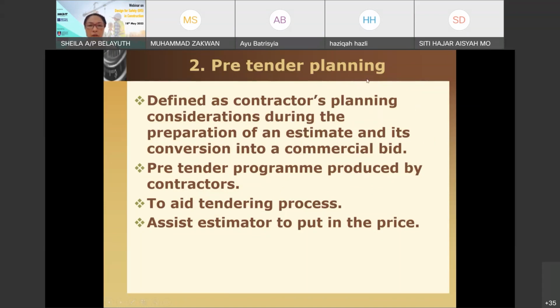Okay, so if the contractor does not emphasize or does not fully consider this phase and fully come up with a bid which is close to realistic, then whatever price you put in there, that will be the pricing. If it's too low, there's no way you can challenge it because you placed the bid. Okay, so if it's agreed upon and you have been selected as the winning contractor, in the next phase you will have a problem if the bid is too low and unrealistic. That is why less quality materials and so on may come into the picture, because the bid was too low.